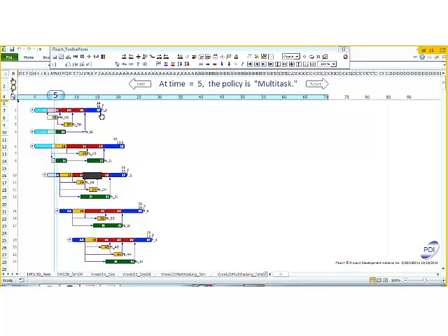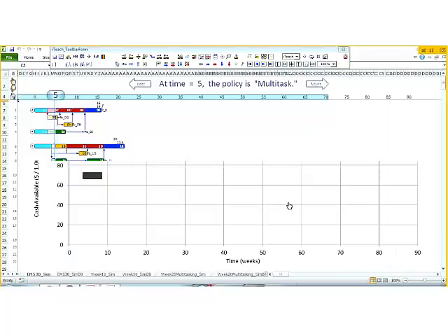Right, let's look at how we're doing compared to our commitments. Project 0 looks like it's on track, so the Project 0 project manager is probably going to get a bonus this year. Project 1, commitment date is week 20. The expected finish is at 21.6, so it's a little behind, but maybe we can catch up again. Project 3, commitment's week 22. Looks like it's right on track to finish on week 22, so that's okay.